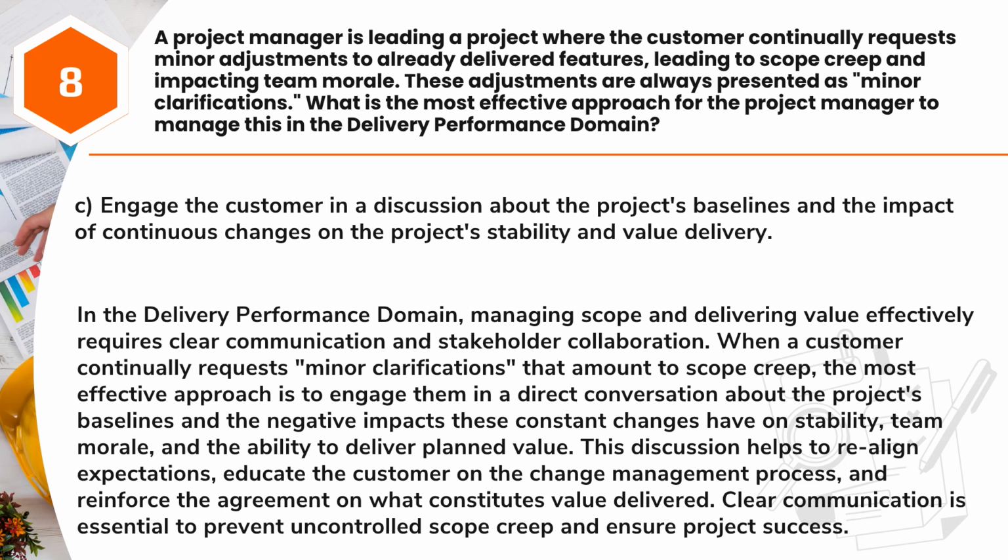in a direct conversation about the project's baselines and the negative impacts these constant changes have on stability, team morale, and the ability to deliver planned value. This discussion helps to realign expectations, educate the customer on the change management process, and reinforce the agreement on what constitutes value delivered. Clear communication is essential to prevent uncontrolled scope creep and ensure project success.